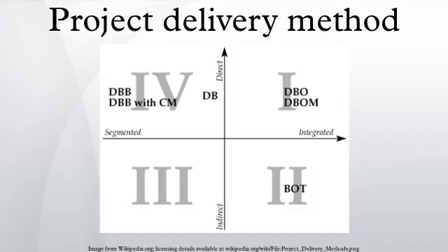Build operate transfer. BOT represents complete integration of the project delivery. The same contract governs the design, construction, operations, maintenance and financing of the project. After some concessionary period, the facility is transferred back to the owner.